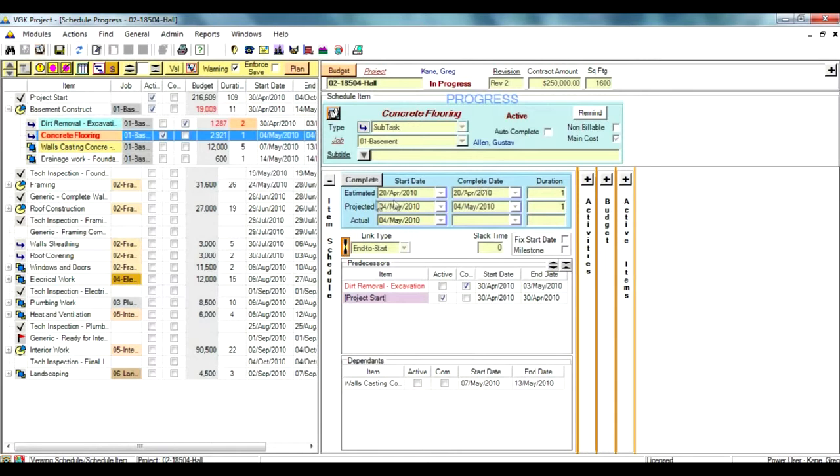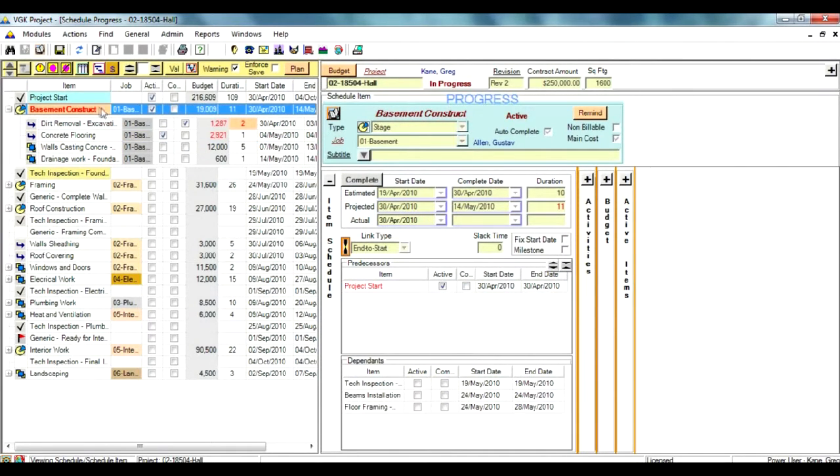Each item keeps its planned dates independent from its actual dates, and this allows you to keep track of the planned values and compare your actual timeline with them. For items that are not completed, the application shows projected dates of completion. This provides a reliable schedule forecast and allows managers to foresee the future of the project, which is of course very helpful when things start to deviate.